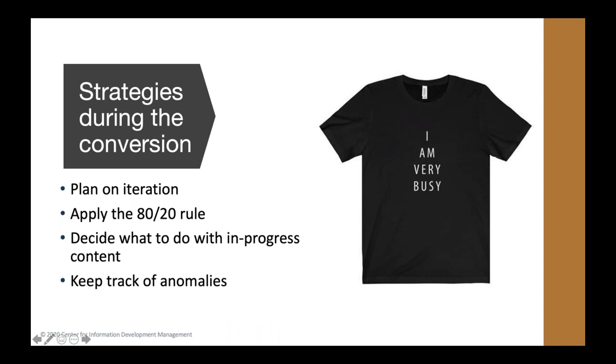All right, during the conversion, plan on these activities. Iterating the conversion specification as new data patterns are identified. The vendor will communicate the issue with you and identify an example, and you, your IA, or the core team will need to decide what the disposition is.